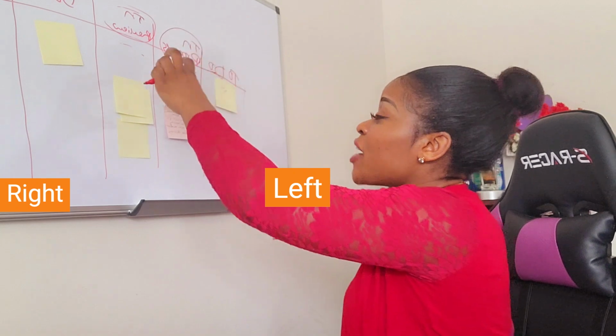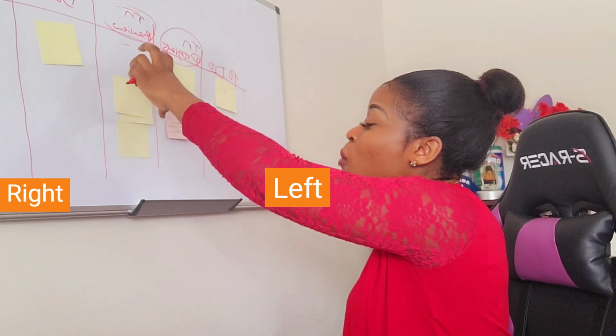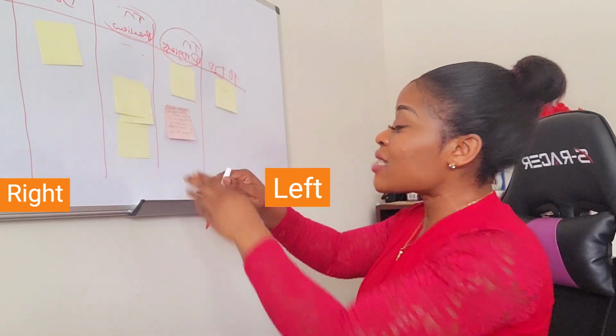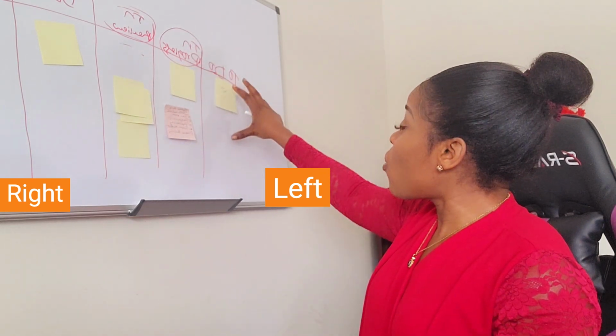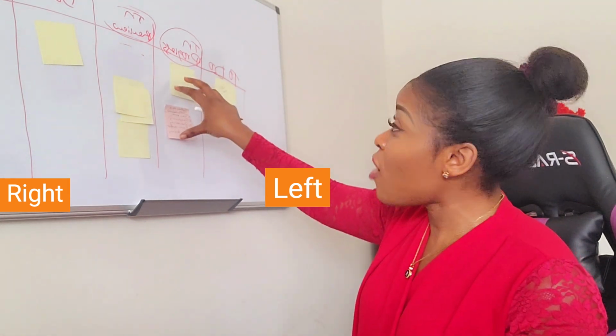So my focus is to ensure that we focus our energy on closing out more of the work items in the review column, and doing more closing out of the work items in the in progress column, instead of picking more work items and opening new stories and putting them in progress.